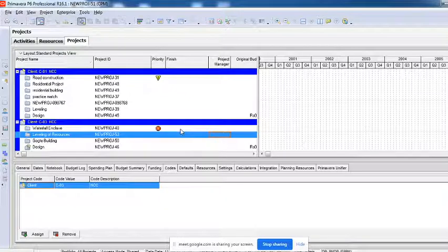And it can be created in a way you want it, by type of projects or based upon project managers. In fact, many times we do this. The project codes are created and assigned with respect to the project managers. I want to know which project manager is handling how many projects and what the status of that is in terms of anything and everything: time, cost, risk, anything. So you can group these projects the way you want to monitor them, the way you want to generate a report.